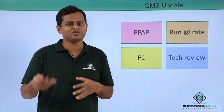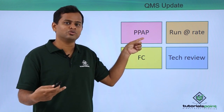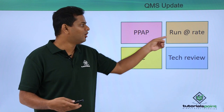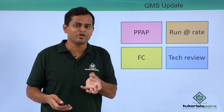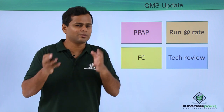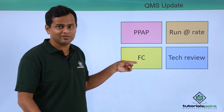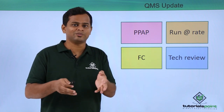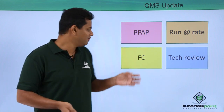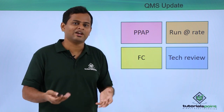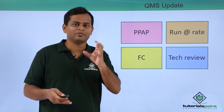The QMS (Quality Management System) update also plays an important role. There may be a Production Part Approval Process (PPAP) to be done based on the customer agreement. The runner rate may also change — meaning the amount of parts produced in the same time can be affected by changes. We may also face a case of new feasibility commitment, where a change makes a project non-viable from a commercial or technical point of view. In the tech review, we take all these things into consideration.